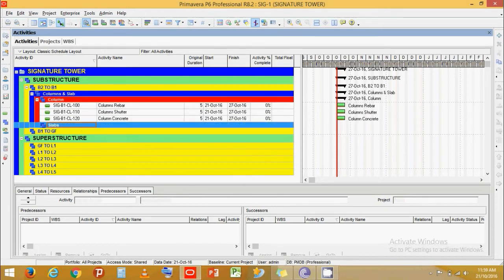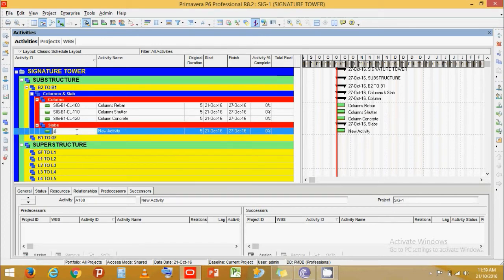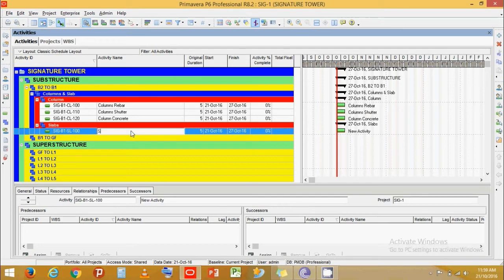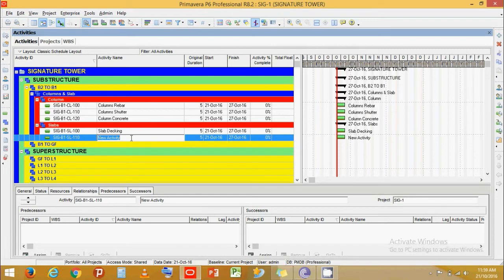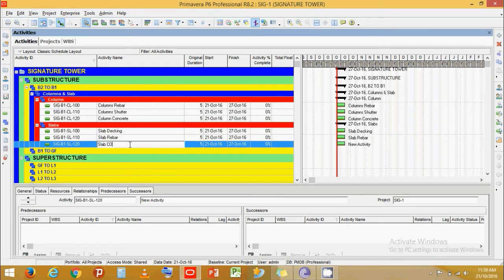Now let's do the same for Slabs. Press Add. The ID will be SIG-D1-Level-Slab-100, for Signature D1 Level Slab 100. Let's call it Slab Decking. Then add Slab Rebar, then another Slab activity, and finally Slab Concrete.